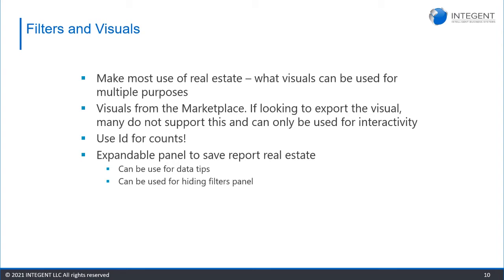And also, if you are going to export your report, let's say it's a project status and you deliver that to your client on a monthly basis, some visuals do not support exporting. You can do it from the desktop client if you want to, but if you have your report in a workspace, some will give you a big X when you try and export it and say this visual does not support exporting. So when you finish building your report, if you're going to publish it to a Power BI workspace, always try that export first to make sure that that visual will export. With those timelines in mind, I have found a few of them will and a few of them won't. It is about 50%. So always make sure you try that.